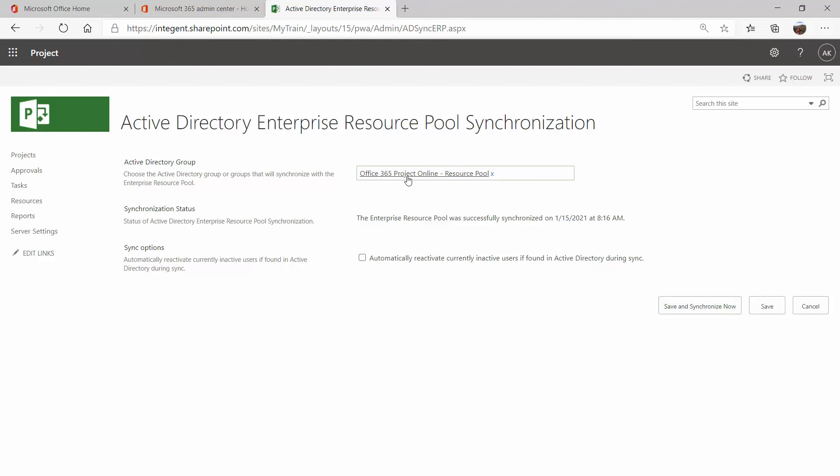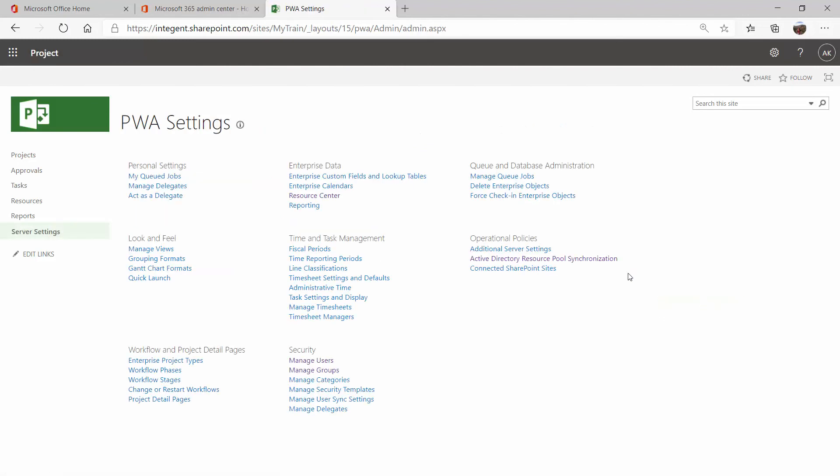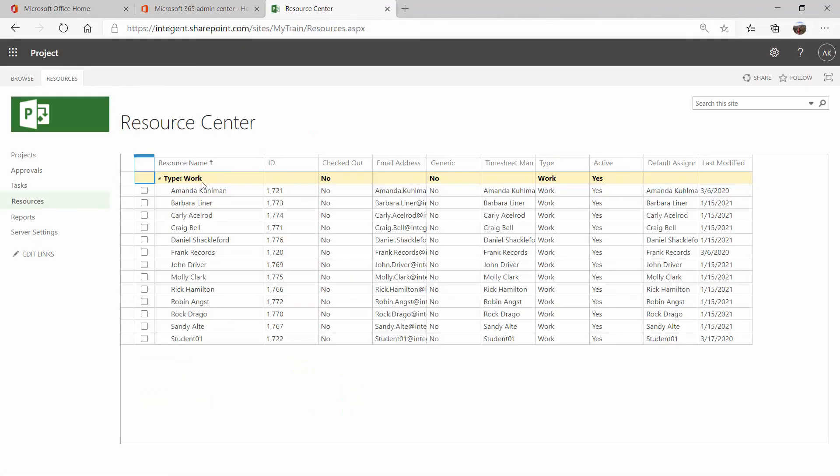So you can add your group in there, go ahead and click save and synchronize now. And if you were to come over to your resource center right now, then you will be able to see the full list of all of the resources that have access or that have been added to your resource pool here. You can also add resources to be in those groups, even if they do not have permissions to log in or have a license. So if you want all of your team members to show up here in your resource pool, but at this part in your deployment, you're not looking to give them a license to log in directly, you can still add them there.